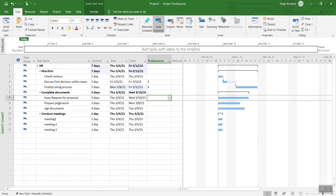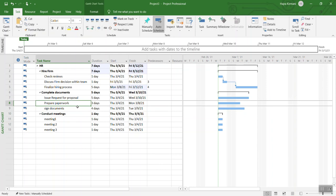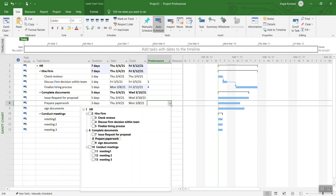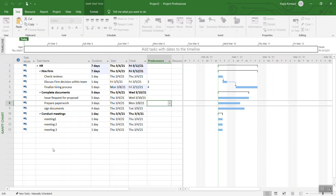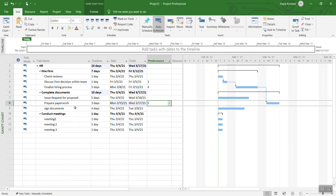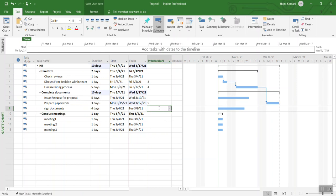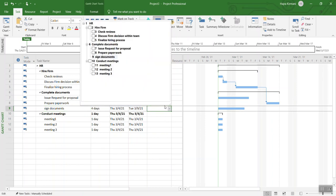It totally depends on how HR is operating in that firm, so we can leave that one. But for example, we can take this one, prepare paperwork. Over here we see that the paperwork cannot be prepared until you have the decision from the team and finalize the hiring process. So you can say that you have a dependency on finalizing the hiring process before the paperwork is done. Similarly, we cannot sign the documents until the documents are ready, so we can say prepare paperwork.